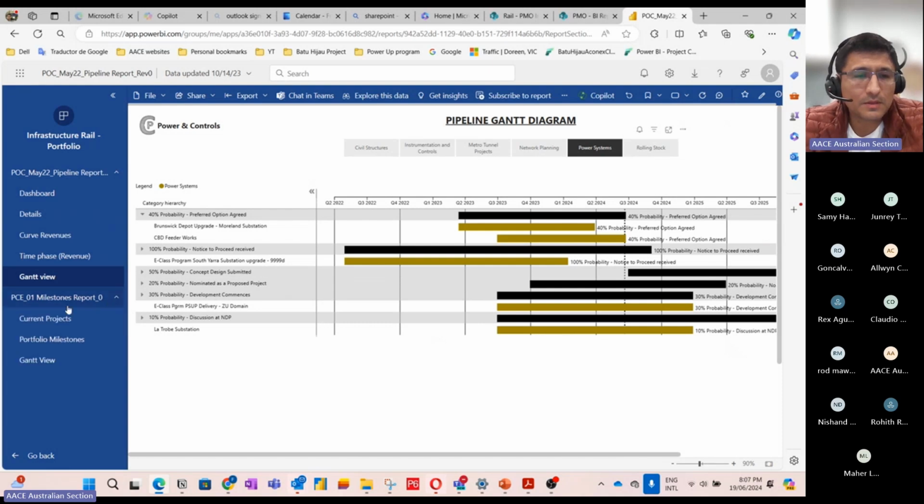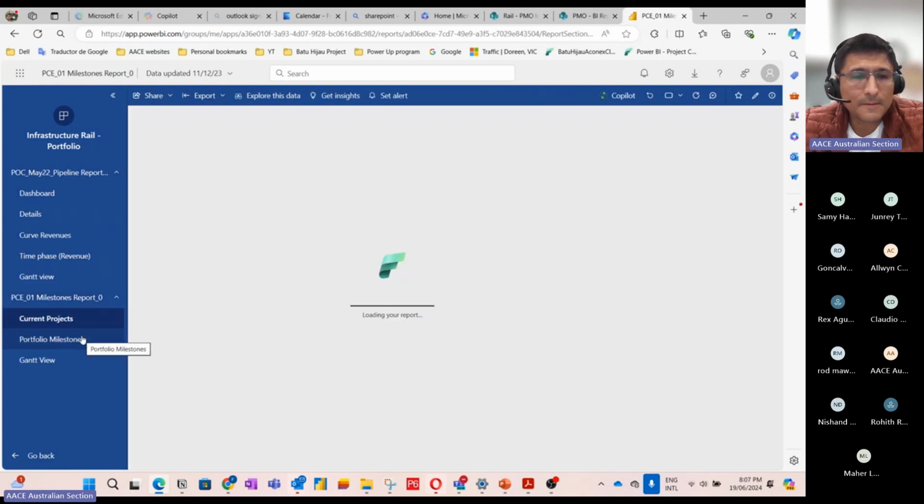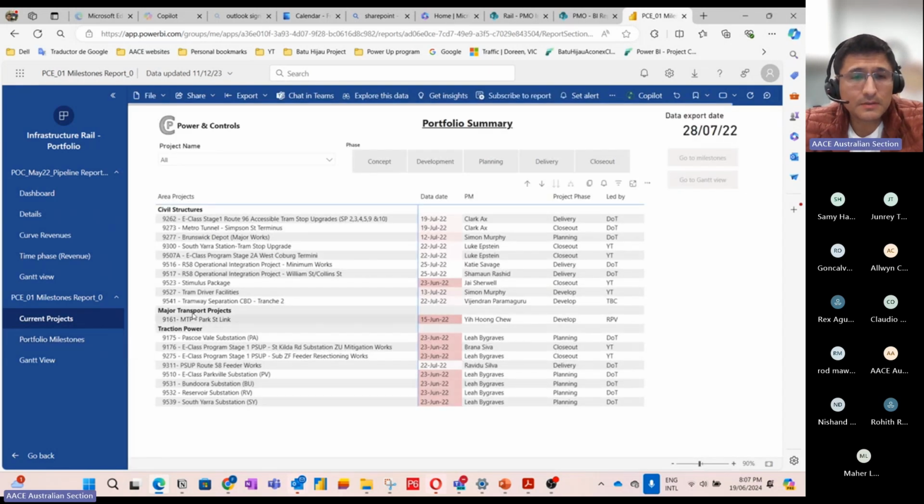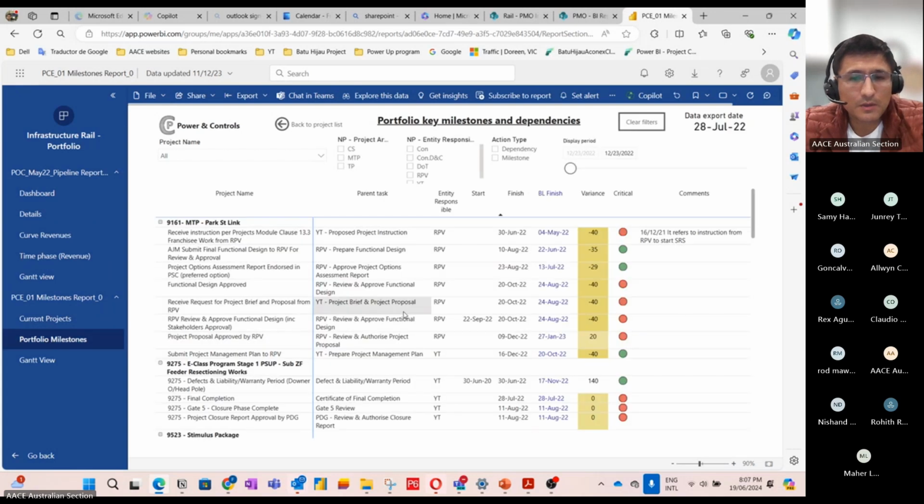We had a milestone report as well that was using project data from P6. Just a simple summary of the data date of the schedule. And we had some milestones within the project to see what the status of them is, right? We had the color code here for flagging which milestones are critical and we have to pay attention to.